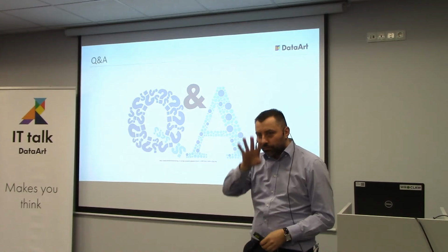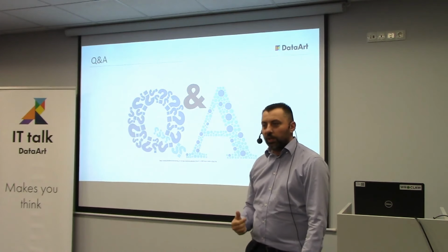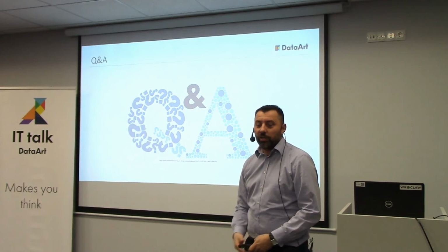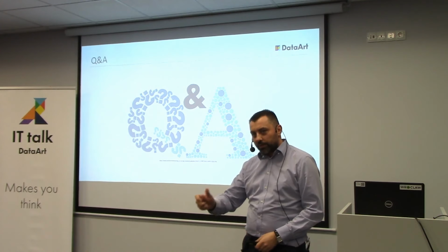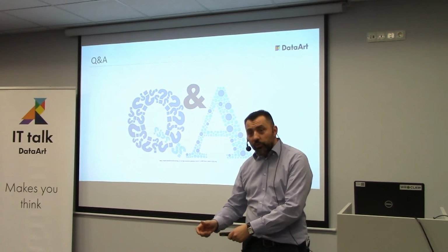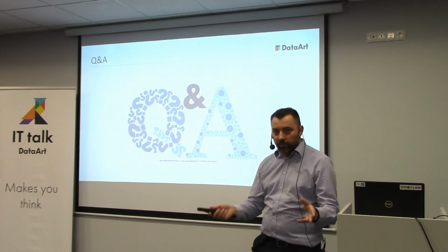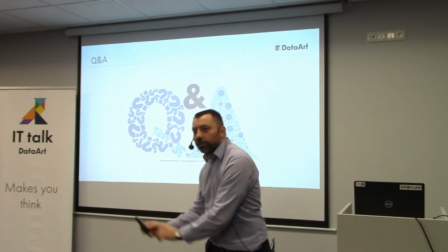Still, you need a framework, the base, the actions, what you do with that. And this is Scrum. I know Scrum. I don't know lean much, so I took artifacts from Scrum and started to introduce them as they could be introduced. Let's say we start with Jira, then we start with structuring like epics, stories, and tasks for the developer.